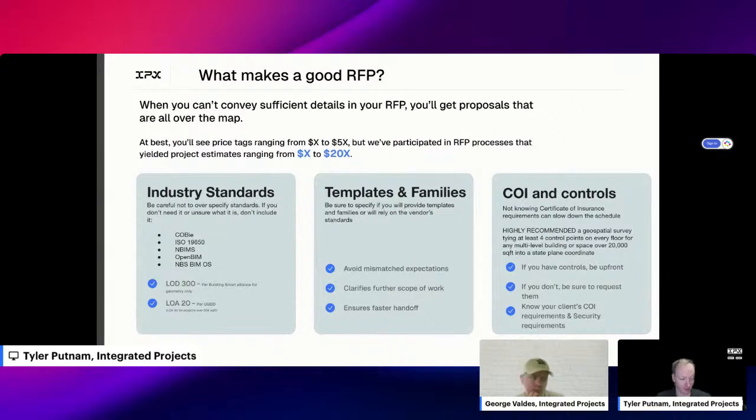And funny enough, whenever you hear about these things, it's because there's some function downstream of, usually digital twin or something else. But if the goals of those projects are not explicitly defined, and if you don't already have COBie standards developed, or these other things, and you're not concretely specifying what you need and what they're going to be used for, what ends up happening is everybody on the proposal submission side is basically just going to inflate contingency line items to compensate for the lack of information.